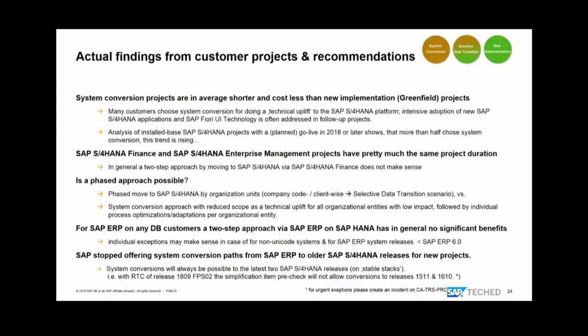Exceptional or phased approaches are possible. You can do a system conversion with pure focus on the technical implementation, then let different business units innovate independently. Or you can do a new implementation with phased data migration company code by company code. However, be aware that a phased approach means a coexistence of two system landscapes with interfaces between them, since you rarely get a clean cut between org units — this requires significant effort and isn't necessarily supported by SAP standard interfaces.